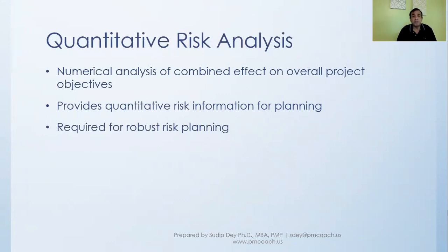Now, robust risk planning may not be needed for all projects. As we have just mentioned, it is not necessary that all projects will go through this quantitative risk analysis process. Typically, large projects, complex projects, and those which have a high priority and are very sensitive will go through quantitative risk analysis.